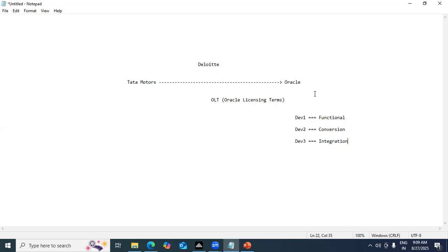Oracle needs to know when is your go live date, when you are planning to complete your project. Oracle needs to know when is your SIT, when is your UAT, when is your CRP. Everything Oracle needs to know, because accordingly the refresh plan will be decided. So it's a collaboration of all the three companies to do the cloud implementation. Do remember this thing.